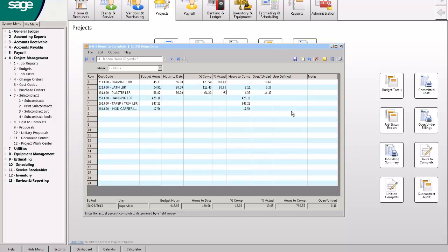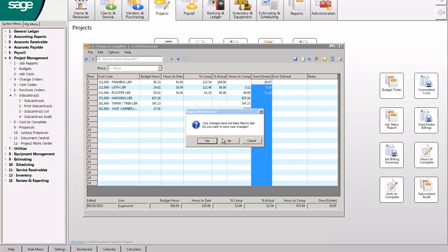So he comes back and says, we're having a tough time, Allan. We're only about 45% complete. Well, now I can look and say, hey, I need another 44 hours out there, and I'm going to be 21 hours over budget. The purpose of this is not to put anybody's feet in the fire. But as I'm doing this, I can look at these items when I come back to bid the next job to see if I hit my budget or not. Or if I just want to know how well the job did, I can come down here to the bottom and say, I budgeted this many hours, and this is where I'm going to wind up when I'm done with the job. I'm going to be 38 hours over budget, or about 3% more hours than I anticipated. So that's one way of looking at it.